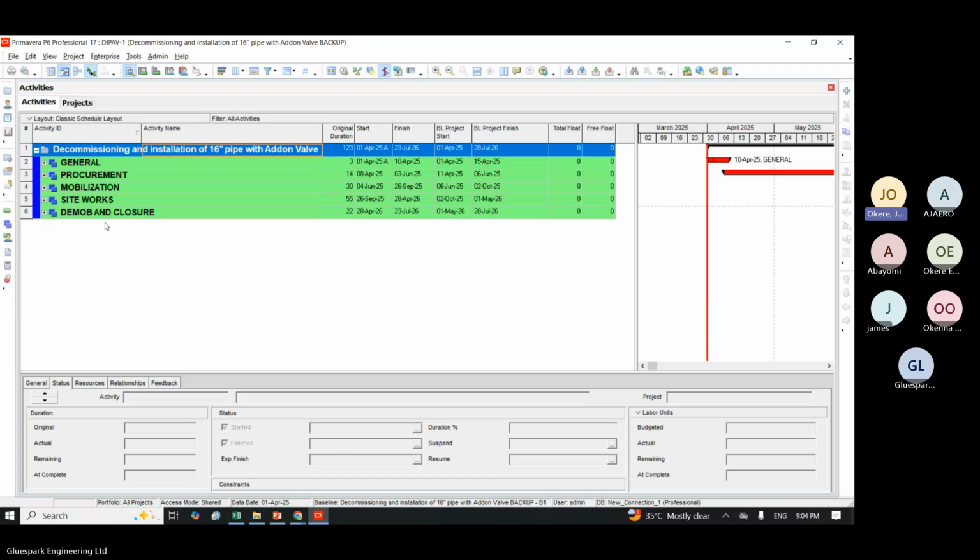You will not start calling the second contractor on the phone. You will just look at the integrated schedule and activate a filter to filter only procurement. So everything procurement, whoever owns it, whether contractor 1, 2, or 3, will come out. You can now look at it and say our procurement activities, all of them, are meant to arrive at such and such a time. Look at when we are finishing procurement. That is the need for an activity code.